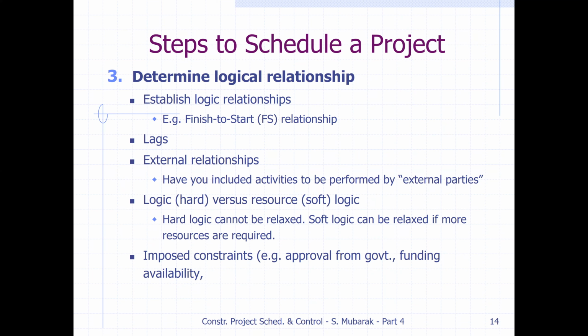When they were building stations, they found there was a water supply line, or a telephone cable line, or an electric company power line underneath, which needed to be relocated. In that case we have to follow those imposed constraints from the owner, from the client. We will discuss scheduling with constraints, inshallah.